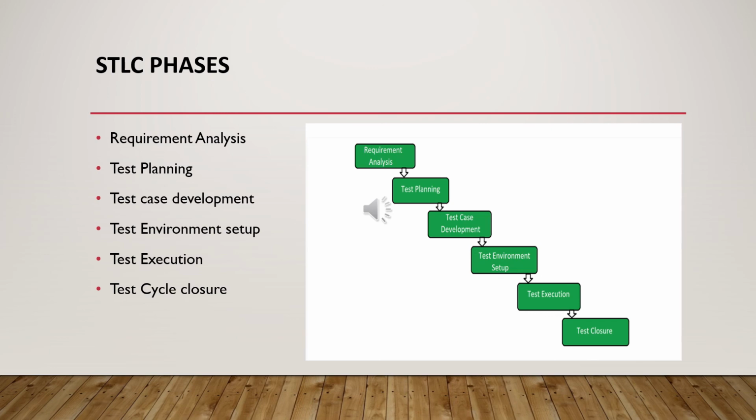This phase is almost the end of the testing activity, with completion of test execution, which involves several activities like test completion reporting and testing metrics. The testing team members meet, share, and discuss the testing artifacts to identify the test strategy that has to be implemented in future. They take the lessons learned from the current test cycle, like what has to be improved and what has to be addressed. It's kind of a brainstorming session to understand what can be done better in the next release.